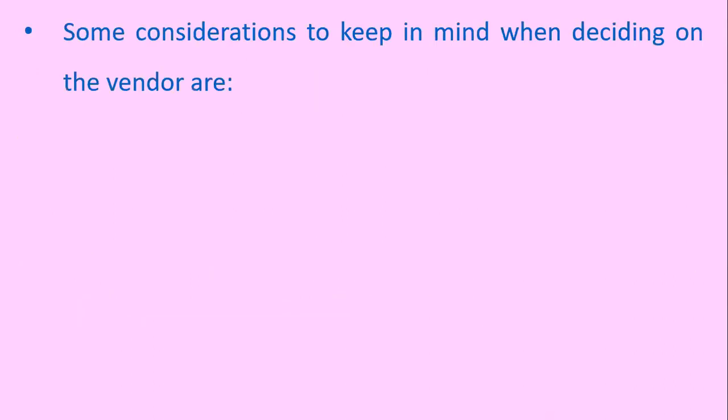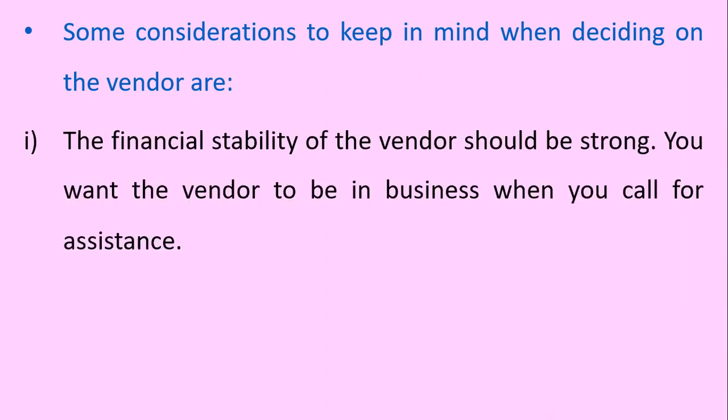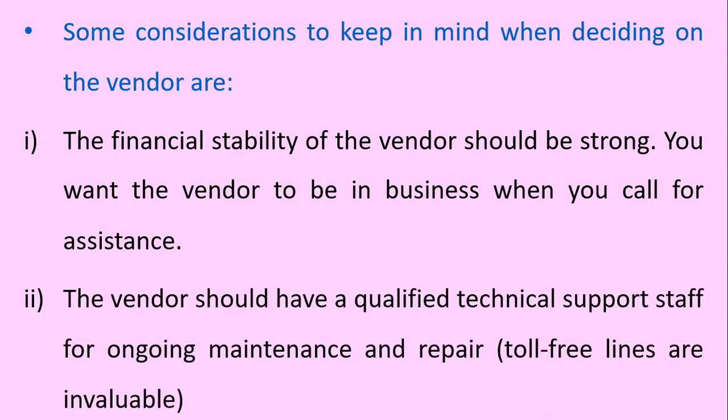Some considerations to keep in mind when deciding on the vendor include, number 1, the financial stability of the vendor should be strong. You want the vendor to be in business when you call for assistance. Number 2, the vendor should have a qualified technical support staff for ongoing maintenance and repair with free phone lines.